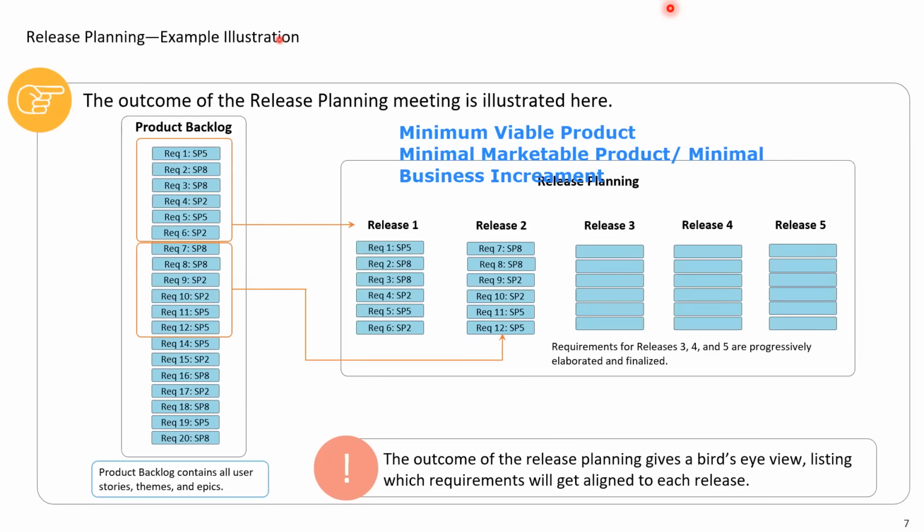Now, if I analyze the data of this minimum viable product, for example, how many hits the website has, and how many people actually come to me through the website, if I capture this data, will it help me to assess the viability of the product or not? Yes. Now, suppose a significant number of people came to me through the web page that I have created. It is an indication that I can go ahead with the first version of the product, right?